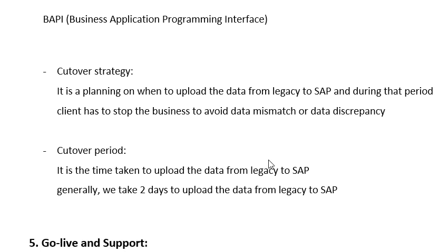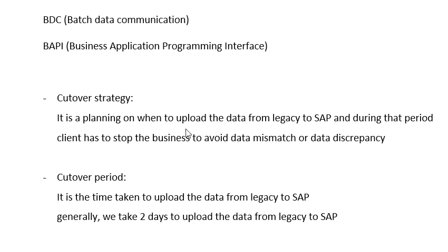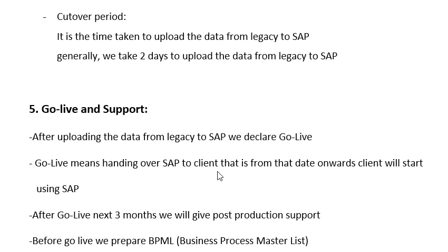Here we have the cutover strategy. It is planning on when to upload the data from legacy to SAP, and during that period, the client has to stop the business to avoid data mismatch and data discrepancy. We have the cutover period, which is the time taken to upload the data from legacy to SAP. Generally the consultant will take 2 days to upload the data.